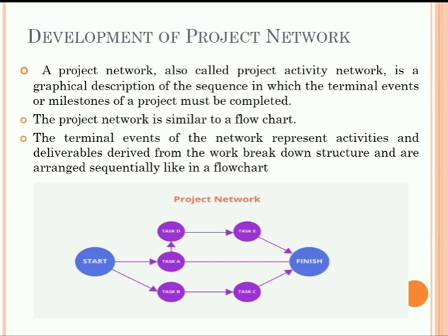Left to right arrows are used to show exactly the flow of that particular network diagram. Next, you have to use just one starting point, the start event, and one cumulative point or end event. Only one starting point and only one cumulative or end point.